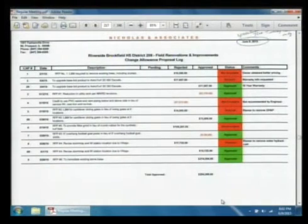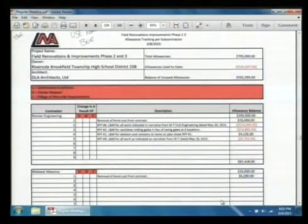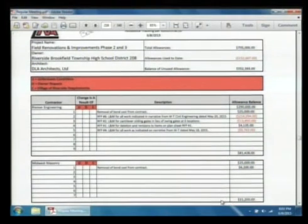The next document summarizes our change allowance budget and also shows credits back to the district. You'll see that overall at the top of this page, we've used about $152,000 of our change allowance with the credits back from all the bond contracts. For each different contractor, if it's in red in parentheses, that's been a change allowance that's been approved. If it's black, that's been a credit. Right now on the first page, we've had some change allowances with Reamer in regards to the stone and the sliding gates.